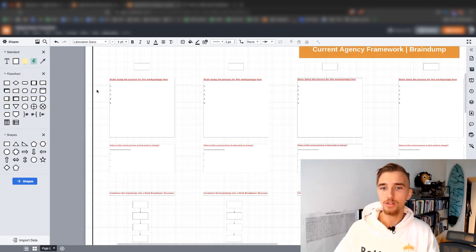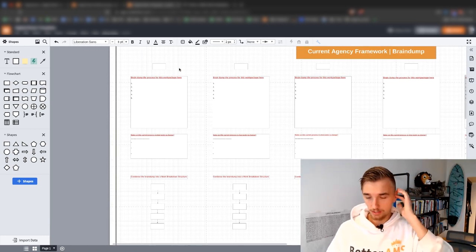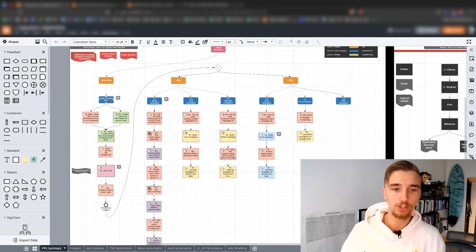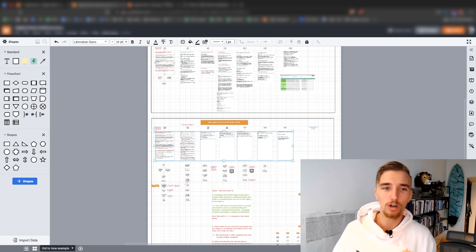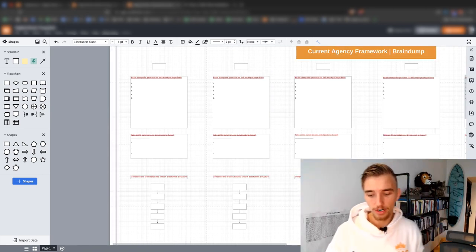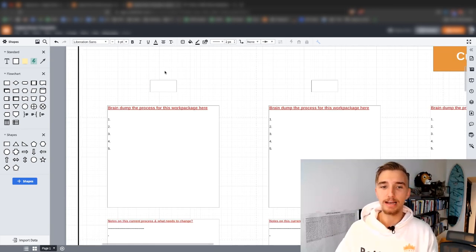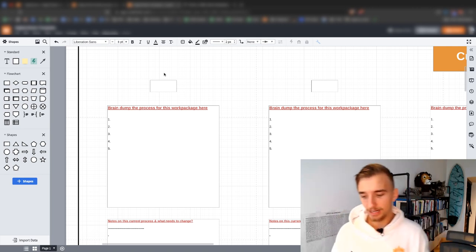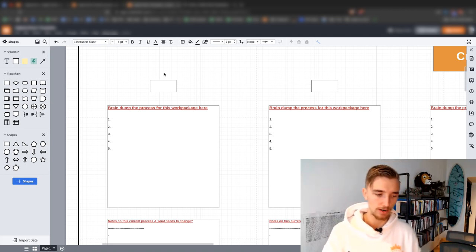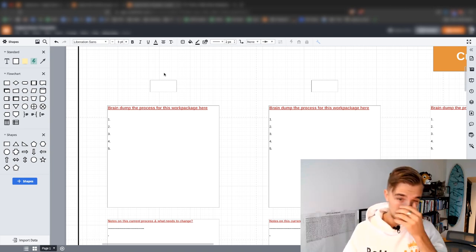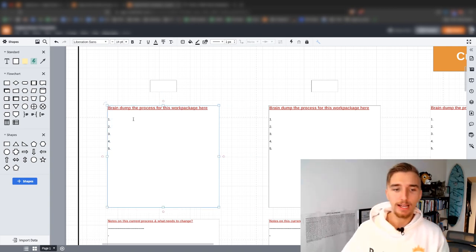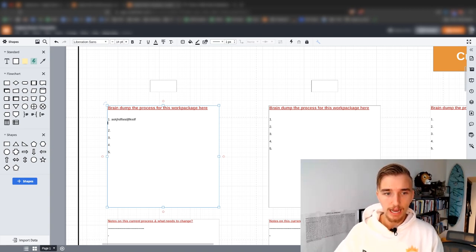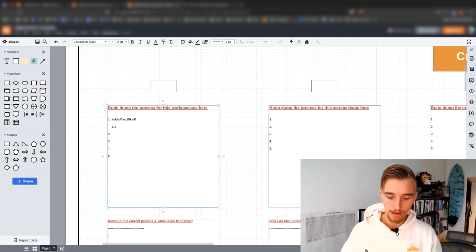So what you can do is first come in and list out the work packages. Again, there are no verbs in the work package. A work package is basically like Trello and Sheet setup, Nexus campaigns, auto campaigns, etc. You can't read a work package and know exactly what needs to get done — it's like a summary of a bunch of activities. If it's finding a new product you want to sell, maybe that's a product discovery process. Then there's a bunch of activities in that work package. Define the work package and then brain dump the process: what's the first thing you do, second, third, fourth, fifth? I like to do something like: the first thing — blah blah blah — and if there are sub-items within that first thing, I'd do 1.1, 1.2, etc.